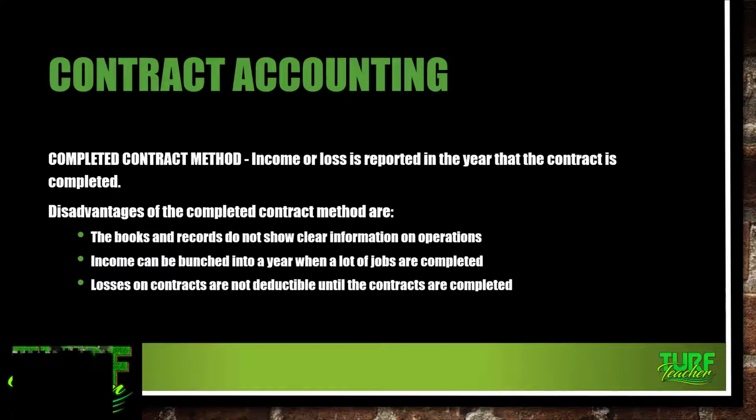Disadvantages of the completed contract method are the books and records do not show clear information on the operations, and income can be bunched into a year when lots of jobs are completed. Losses on contracts are not deductible until the contracts are completed.